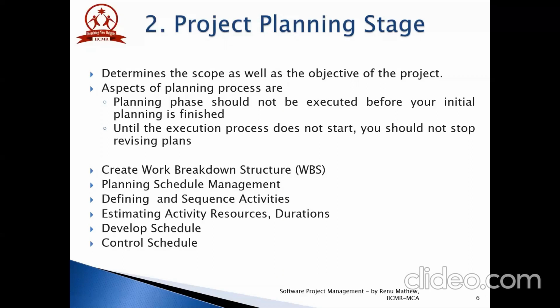For any successful project, the work breakdown structure is important. The steps to create the work breakdown structure are: involve your team and conduct a brainstorm to list all the project tasks. Write down the structure tree of the tasks, also known as the WBS.